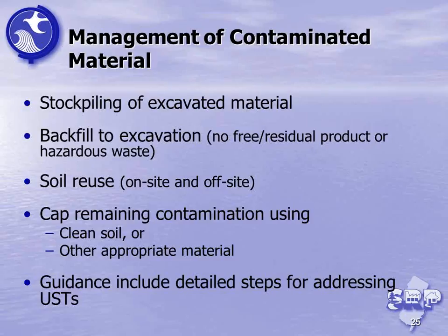One of the benefits of the guidance document is that if you do encounter contaminated soil in your excavation, you're able to return that immediately to the excavation as backfill. I think that's a big benefit. Essentially, you could envision a pipeline contractor excavating a trench, a linear trench, material that comes out of the trench, provided it doesn't have gross contamination, no free or residual product, or is not a hazardous waste, could go straight back in the trench behind as soon as the pipe is laid.